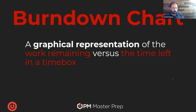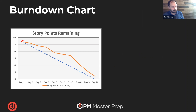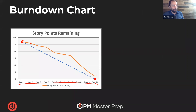It's a graphical representation: burn down is how much work's left, burn up is how much we've done versus how much we've got to go. It could be story points — the amount of complexity in the work — or cards, jobs to do, whatever. It's just to visualize: we got to get this much done in this much time, 10 days or whatever the time box is, and we've got to get down to zero. That's the goal. And then every day we just plot how many we got done, trying to land the plane by going closer and closer to zero.